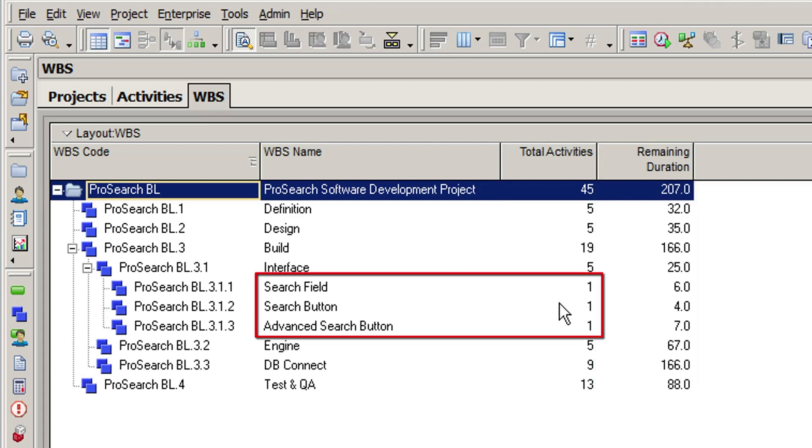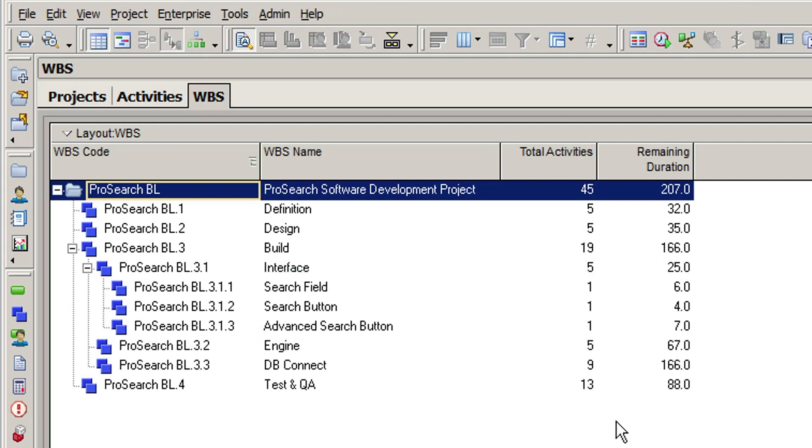With durations ranging between four and seven days each. Too much detail? Probably. If you compare these elements with the level three elements, they are not very balanced in terms of their number of activities.